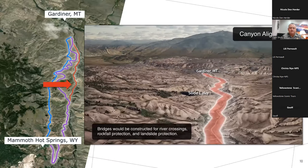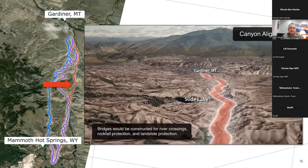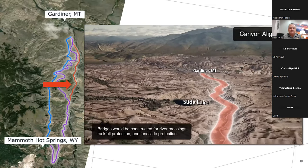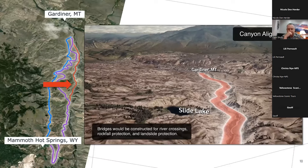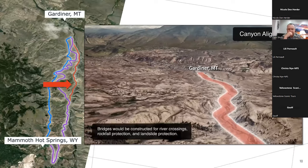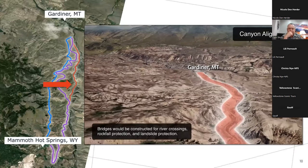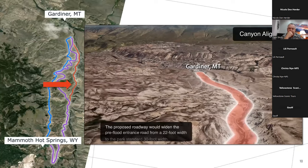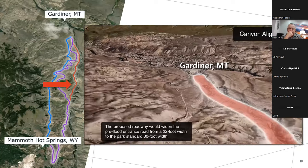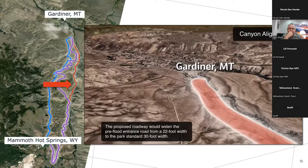This temporary solution opened to the public on October 30th, 2022, only four months after the flood. The canyon alignment would follow the previous pre-flood north entrance road alignment and include several bridges through the Gardner River Canyon. Bridges would be constructed for river crossings, rockfall protection, and landslide protection.